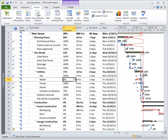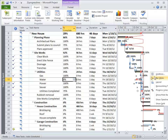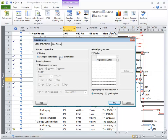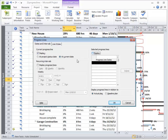So that's a progress line — right-click, progress line. Now if you're updating daily, you could actually show it at the current date, or you could actually set given dates for a progress line. Today I'm just putting it at a set status date.